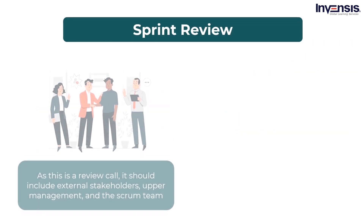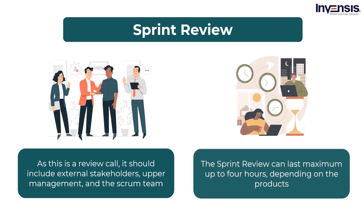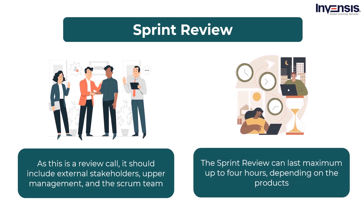The Iteration Review is a chance to highlight the team's efforts, either in a more informal manner such as demo Fridays, or in a more formal meeting structure. This is the opportunity for the team to celebrate their achievements, show off work completed during the iteration, and receive rapid feedback from project stakeholders. Work must be completely verifiable and fulfill the team's quality level to be regarded as complete. As this is a review call, it should include external stakeholders, upper management, the Scrum team — the development team, the Scrum master, and the product owner — as well as developers from another team and customers. The Sprint Review can last a maximum of up to 4 hours, depending on the products.